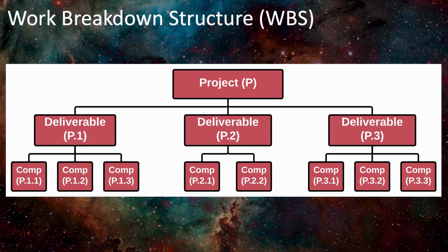This list of deliverables comes from the project charter, from the project scope statement, and then they're put into this hierarchy. From there, they're further defined, further divided. The term that PMI uses is decomposition, the process of decomposing the project into its various deliverables and components and subcomponents and so on. Below the deliverable layer, you can have all the different components that make up those deliverables.